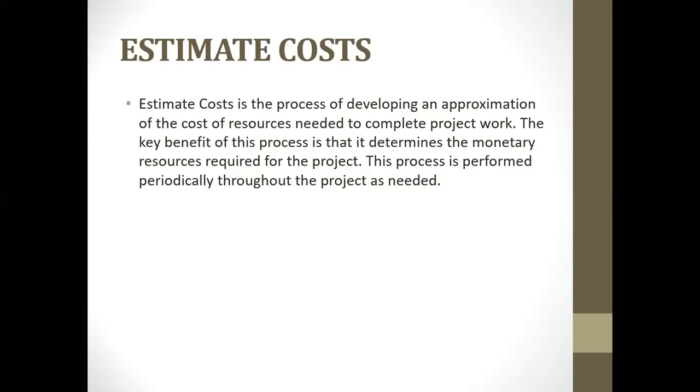and this contract is a firm fixed contract, non-negotiable. You fixed it, non-negotiable. You find out that you'll be running at a loss by the time you enter into that kind of fluctuations or variations. So economic variability is always a benchmark when estimating project costs, all right?